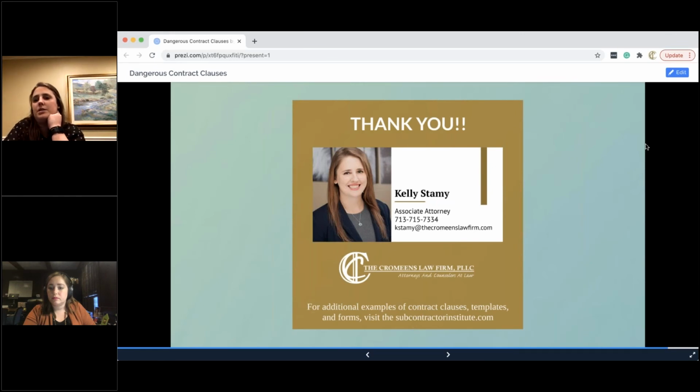Yeah, so that's a good question. Again, that all depends on the timing and what are you waiving. If it's a situation where there is retainage being withheld, then that would be considered your final payment, and so you would not want to waive anything until you get that payment. Final means final, and if there's anything left on the table, then do not sign it. You could instead do an unconditional waiver for that last payment only, knowing that retainage is still coming, and then you could do a final release at that time. But if there is still a potential for money on the table, never sign anything that says final in it.